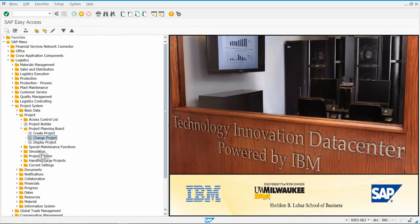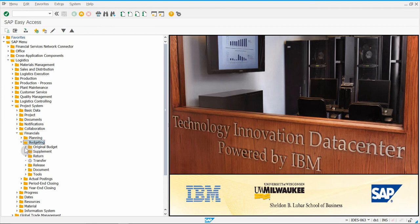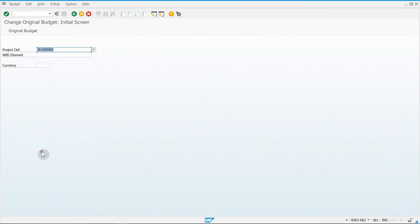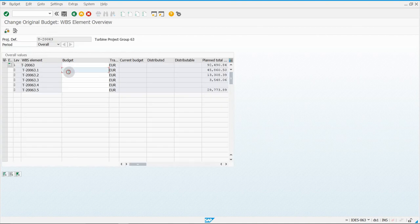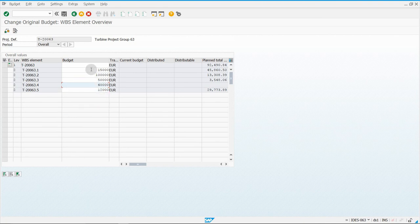Next is exercise 75 — assigning a budget to our project. Be at the Project System level. Go to Financials, Budgeting, Original Budget, and Change. Make sure your project is listed, then click Original Budget. You'll see your different WBS elements. Enter the budget values for all the decimal-point elements — not the top one, but all the others. Start with $1,500. These values correspond to what's listed in the Terp10 handbook. You can pause to write these down.